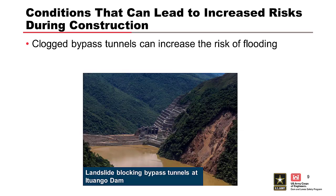If bypass tunnels are used to divert water during construction of a dam, there is a potential that tunnels could collapse or clog during construction, leaving the project with limited methods to pass inflows, which could then lead to overtopping. This is a photo of Ituango Dam, a new embankment dam that was under construction in Colombia, South America, where a landslide blocked the entrances to bypass tunnels, leaving no mechanism to control the pool. The main dam is off the photo, the tunnels were located here, and this entire hillside had instability issues.